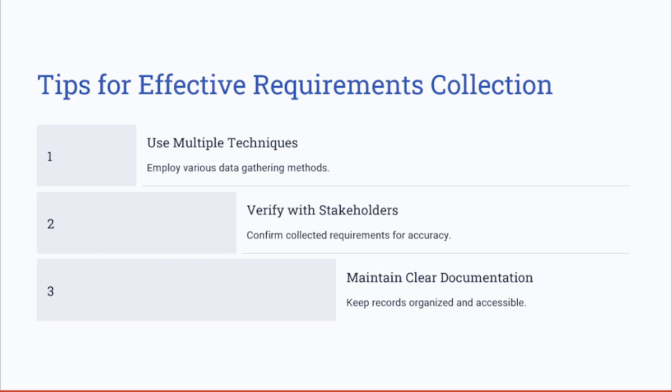Also ensure capturing all of the requirements, utilizing different techniques such as surveys, interviews, or focus groups from different stakeholders to ensure that you have comprehensive requirements. You need also to ensure that you have well-defined requirements documentation and requirements traceability matrix, and ensure that they are clear and organized.